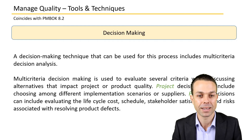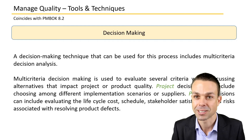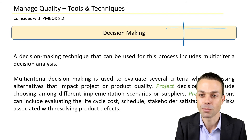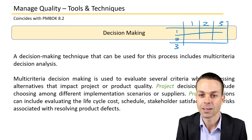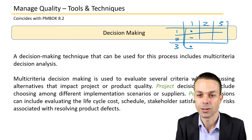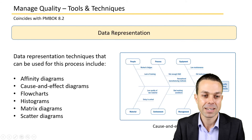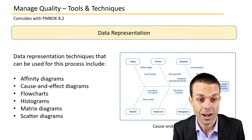Decision making will definitely be needed, including multi-criteria decision analysis. In the matrix, you have options across the top and criteria down the side — you can assess which option meets all the criteria and select that one. Data representation may include various quality diagrams.